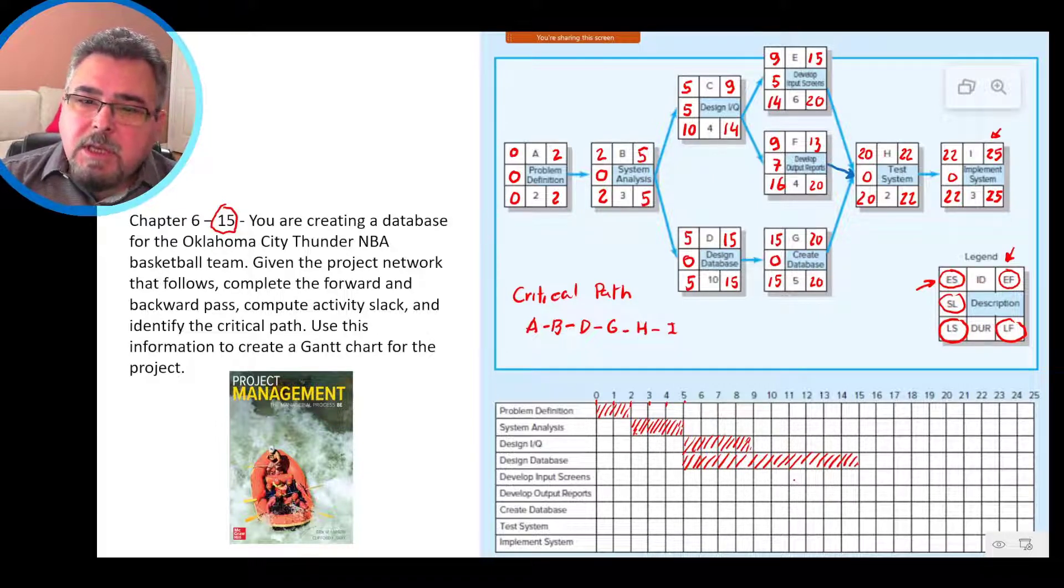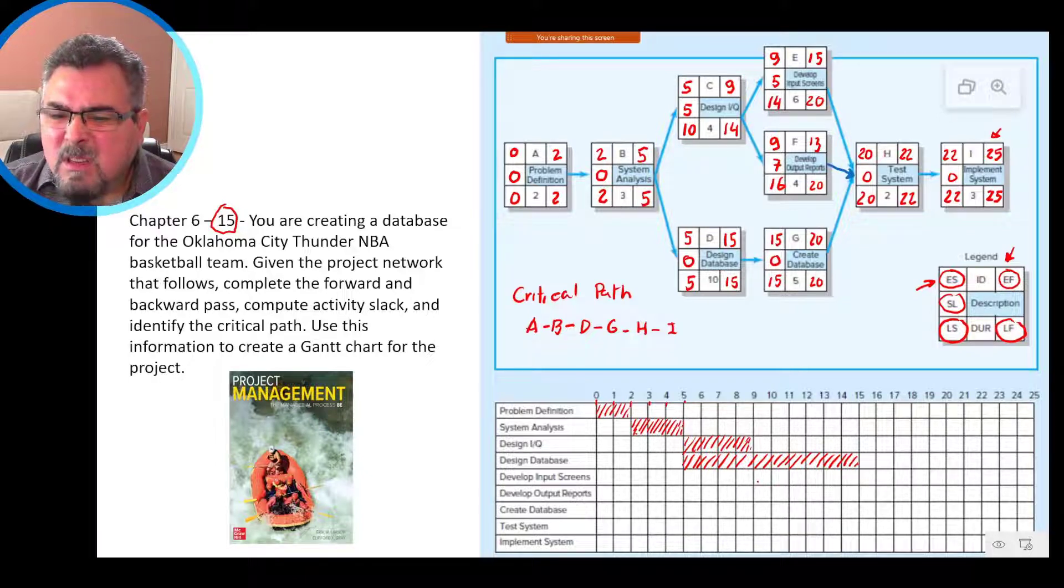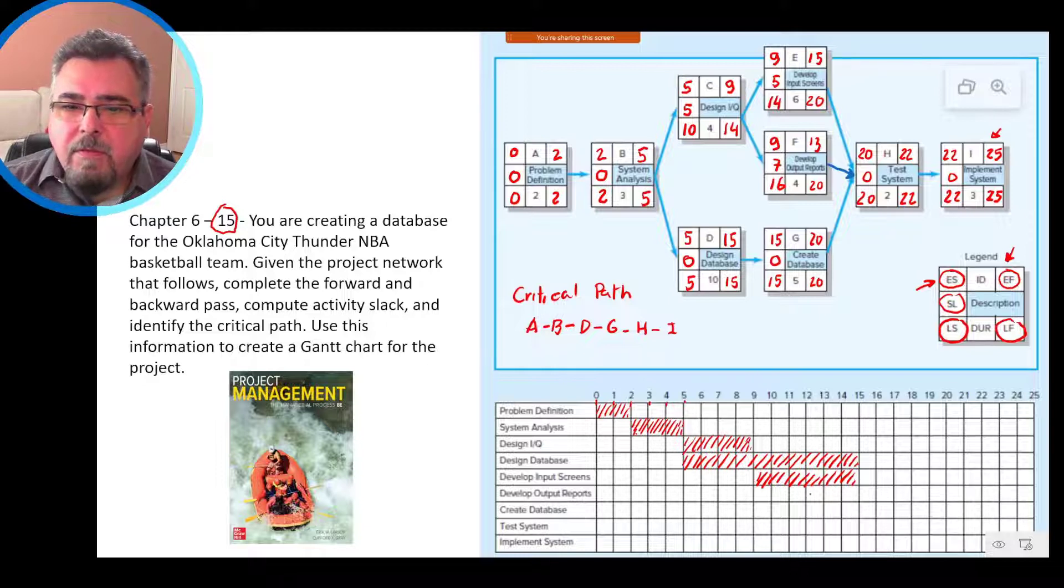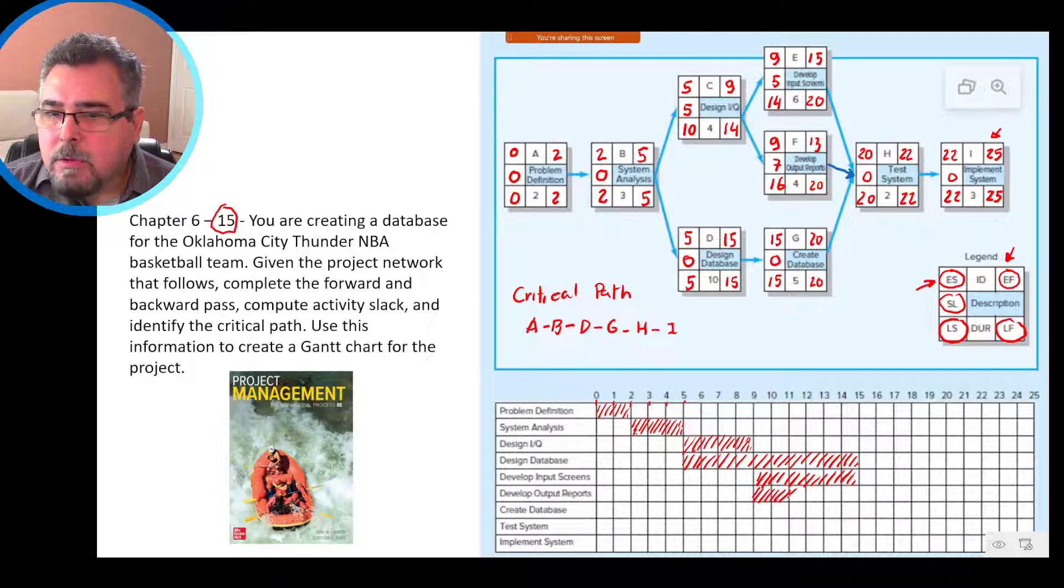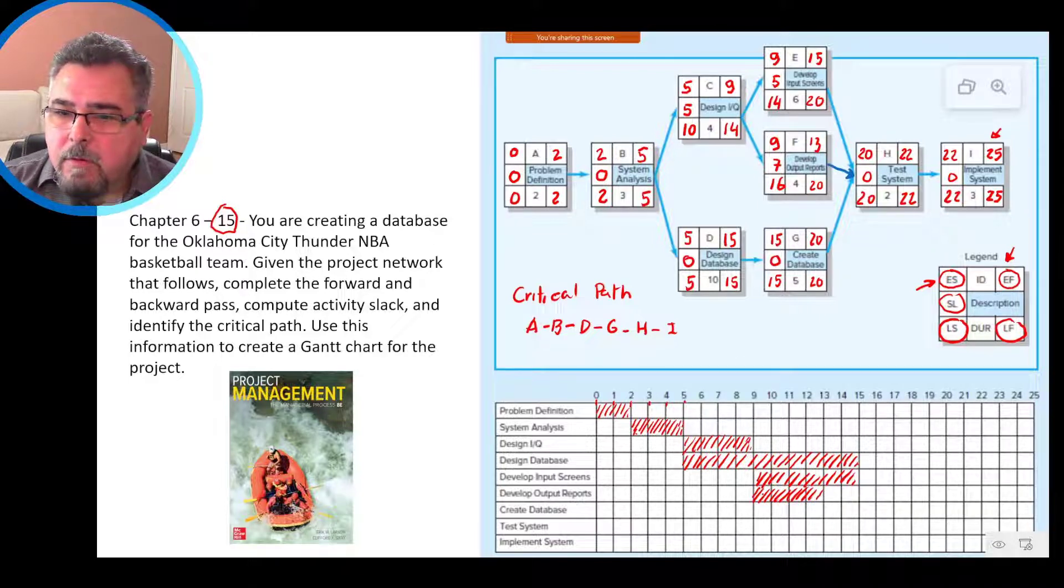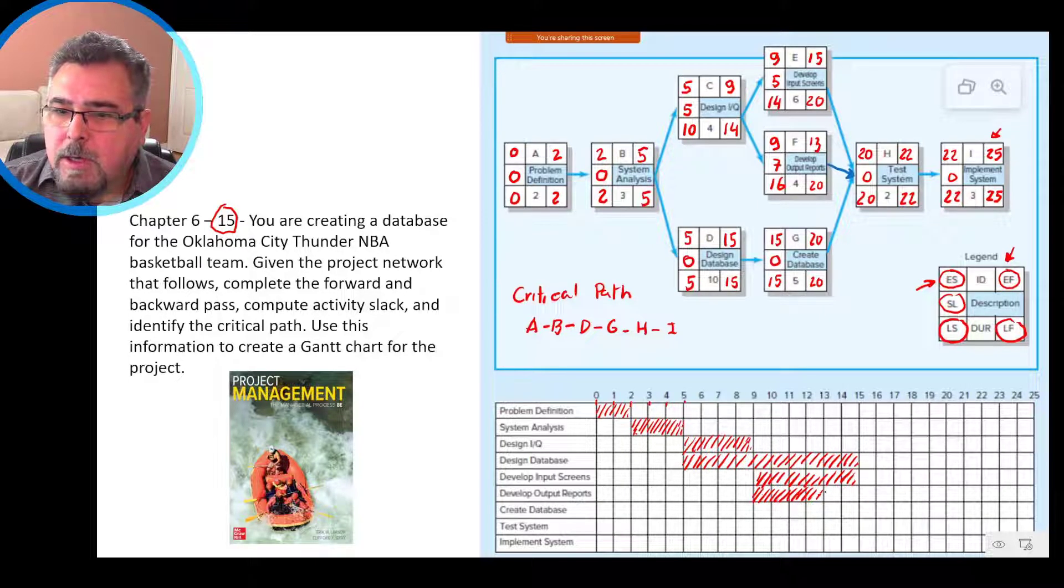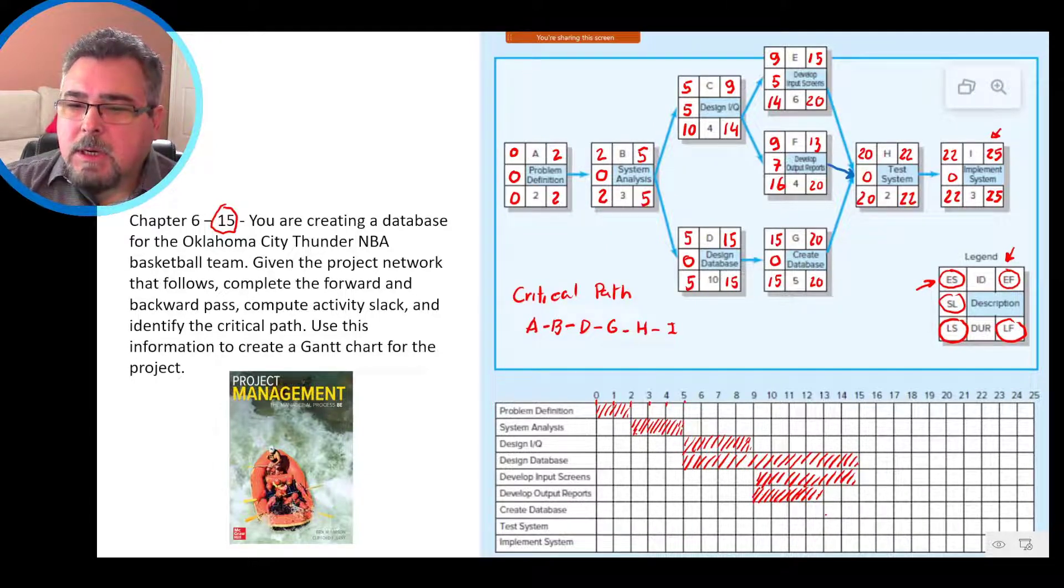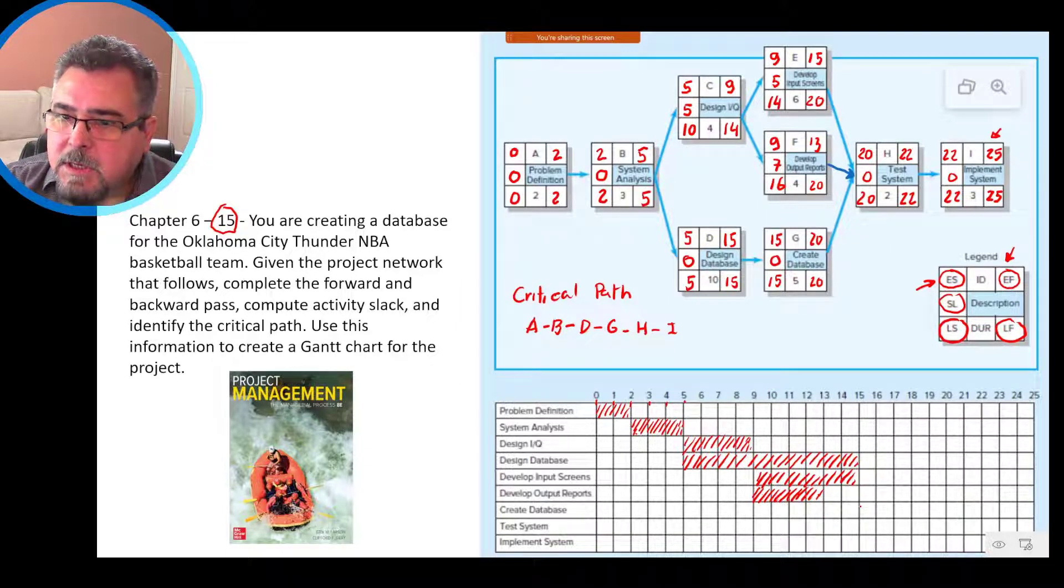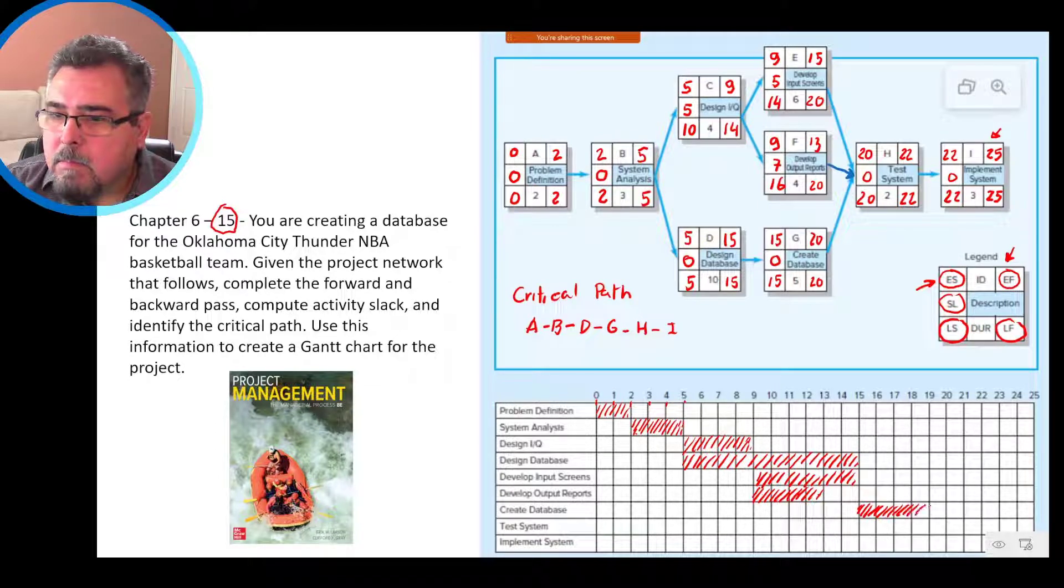Activity E, start on 9, goes up to 15. Activity F, develop output reports, start on 9, go up to 13. Can you see that 4 days? If you go here, you have 1, 2, 3, 4 days. Then we go for create database. What is the create database? Start on 15, goes up to 20.